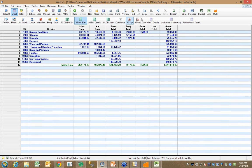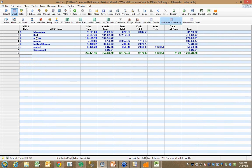but just that quickly, I could go in, and now I'm looking at the same estimate, but broken down by system, by uniformat.